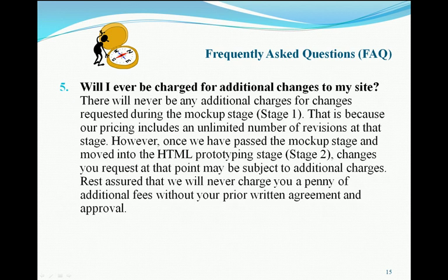And one of the other questions we get a lot is, will I ever have any additional charges for my site? The answer is, there will never be any additional charges unless there are changes requested by you or additional functionality or additional pages or things that you'd like once the project has been signed off and gotten underway. So if you make a new change request that's significantly different or adds functionality or additional pages or other elements of the site that were not included in your original proposal, of course that would increase the cost in most cases.